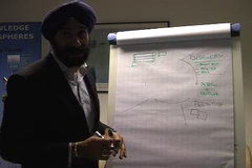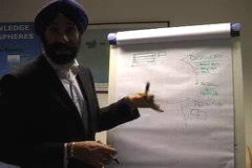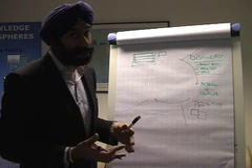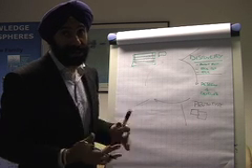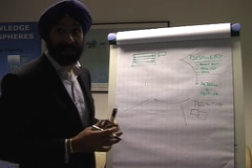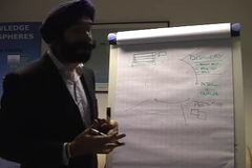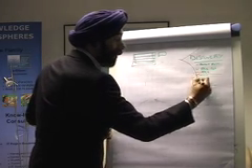So quality criteria are items like, have I completed the specification? Is it a reliable solution? Have I done it to the time that I said I'd do it? Have I done it to the cost that I said I would do it towards? And do you sign it off? Do you agree with my specification? Do you agree with what I've done for you? All the way along we can get sign-offs.